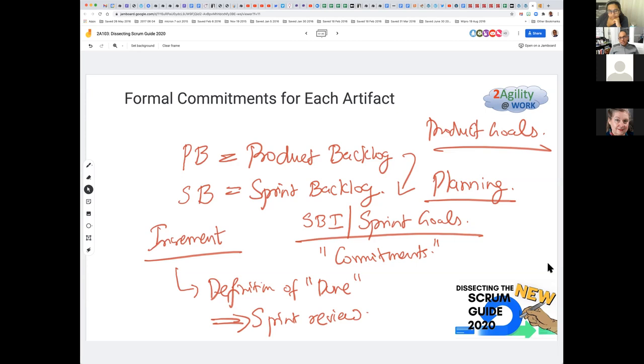So they can say, in the next sprint, I'm going to build these 4 or 5 features in the next 3 or 4 weeks and test them on the emulator, so that I am ready to meet the overall product goals when the hardware is ready in the larger context. So that becomes the sprint goal. Now we are committed to building and testing certain types of features on a particular platform, being ready for the overall product launch. And then to a definition of done.